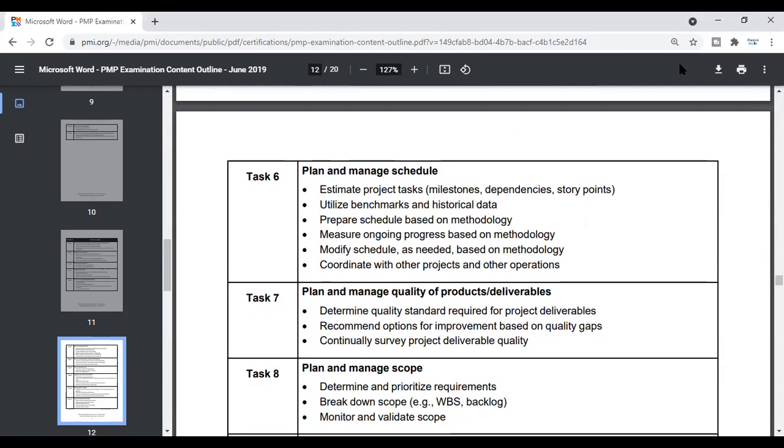In the world of Agile, we talk about roadmaps. We talk about the Agile onion, where we plan at different levels. But when it comes to scheduling, planning at the roadmap level is something that pretty much cuts across the entire endeavor. But coming down to the product backlog and the sprint backlog, when we talk about the sprint backlog, that's when you need to begin thinking about the aspect of tasks. So the summary is, when you take a look at schedule management from the perspective of Agile, it's when you get to the sprint backlog that you really begin thinking about tasks.